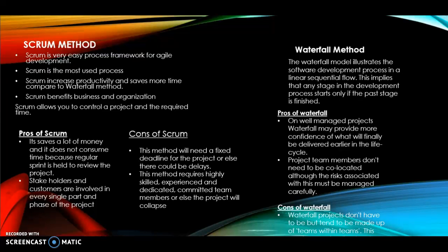Scrum benefits business and organization. Depending on how big or small your business is, Scrum is really good. It benefits your organization. Scrum follows a set of roles, responsibilities and meetings that never change. For example, Scrum calls for 4 ceremonies that provide structure to each sprint: sprint planning, daily stand-up, sprint demo, and sprint retrospective. There's also a team while the project is going on. The team will use visual artifacts like burn down charts and taskboards to show progress and receive incremental feedback.